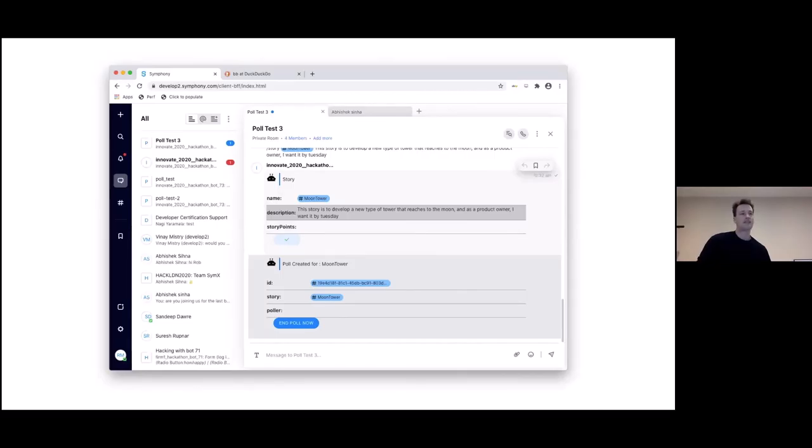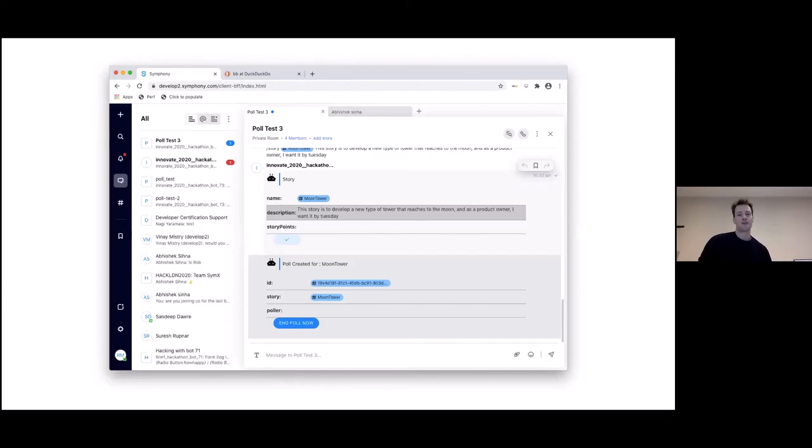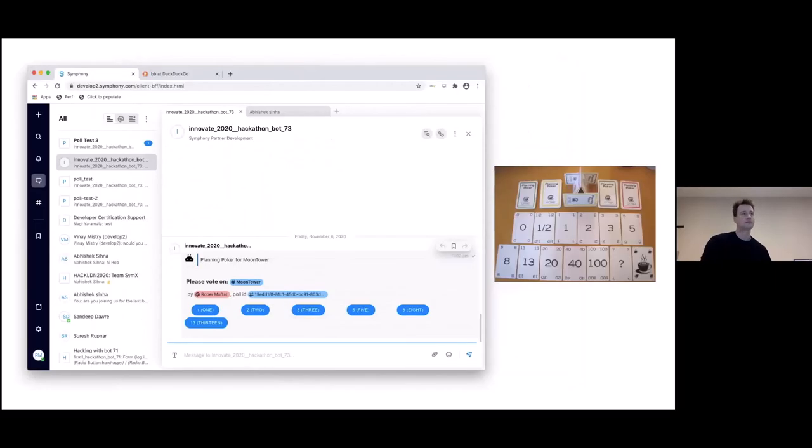We haven't set the story points yet. Next, if I click on that poker button, which in this screenshot has turned into a tick after I pressed it, then our Symphony bot replies back: poll bot created for moon tower. Then there's a button there to end the poll. As you can see on the top left of the screen in that little red circle, I've been notified of a private message from the bot. This is the private message here asking me how many points I want to give to this story. This is the equivalent of the playing cards from that real poker planning game.